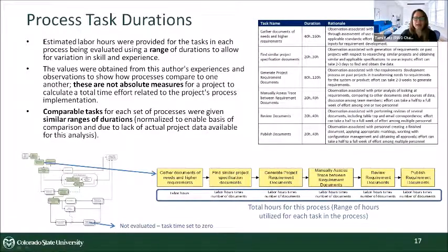Okay, so I'm not going to go over these steps in yellow. I'm going to highlight them shortly, but the idea here is you've got a series of steps associated with a set of tasks you do during requirements management. And each of those should take some amount of time. So I went ahead and did a range of times for each of those steps, and then also figured out, well, what is this based on? If this is a document-centric approach, and I'm getting 5 documents on my project, perhaps I have a performance spec, I have an environment spec, I've got a standard for some sort of structural thing, set of requirements. I've got another standard for some interfaces.